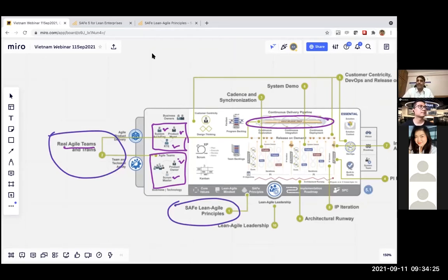So what we do now is we call Ashwinee and say, hey guys, you both are actually creating something useful. Why don't we discuss what the value stream is, or what the start-to-end point is for my company or for this solution? So we both now discuss and find out that some people from Noah's organization and some people from Ashwinee's organization are really needed to build this product, because each one has different skill sets. So we have something called a value stream identification workshop, which we do, and create an agile release train.